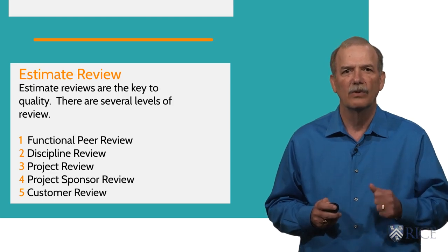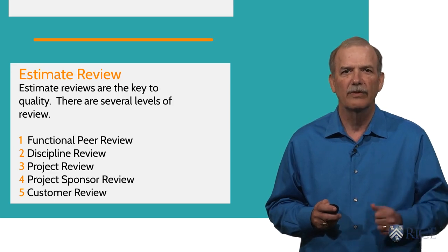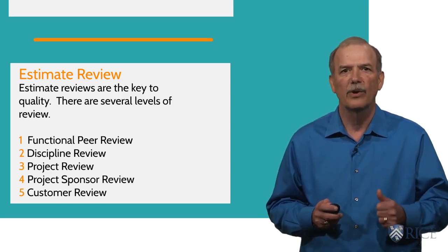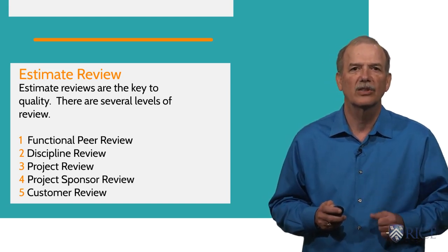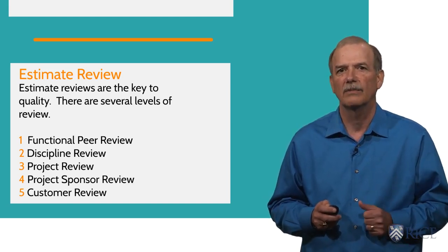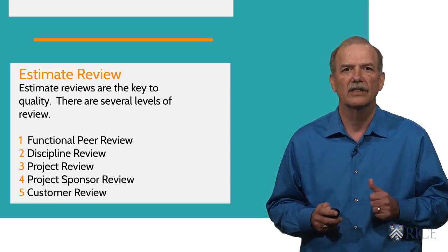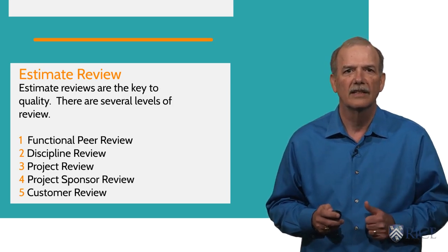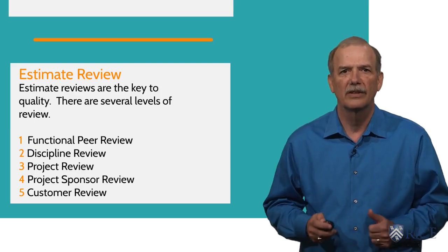The estimate review should also look at the project plan. Did you accurately reflect the scope, schedule, and budget in the estimate? Have we accounted for all the project risk? And does the estimate reflect the proposed execution approach in the legal environment? Lastly, the estimate review looks at the numbers. If the first part of the review is done correctly, the final part is a math exercise to see if it's all been put together properly.